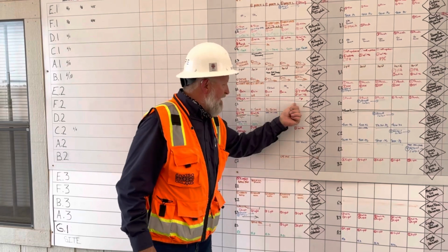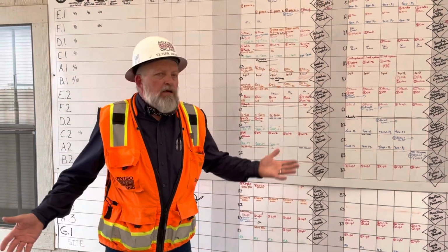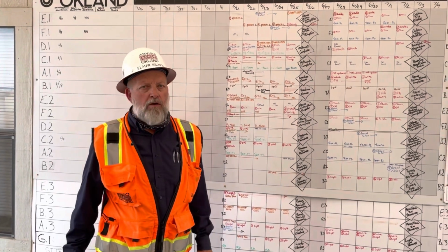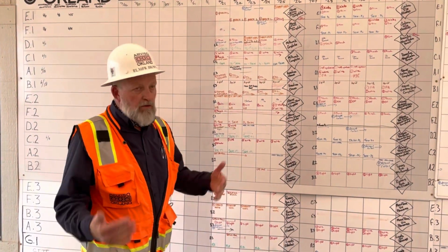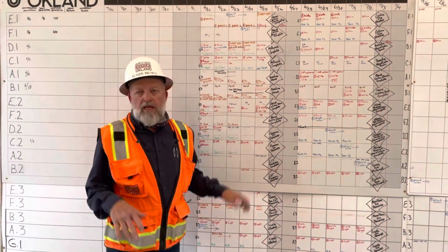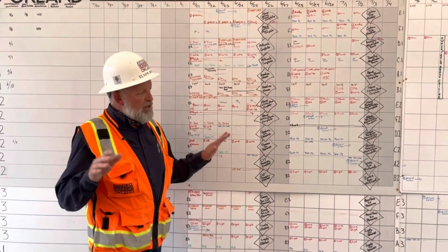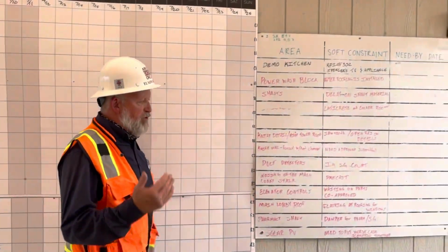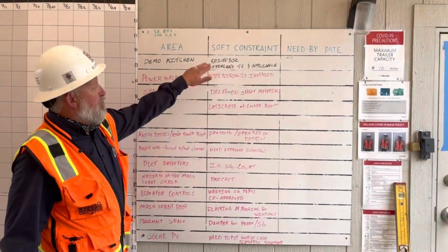I can't quite finish. Well, why not? I never received an answer to the RFI we wrote a week ago. I don't know what to do. I'm at an impasse. So rather than saying, well, okay, I'll check on that, what we say is, okay, let's track those problems, those roadblocks, as constraints.